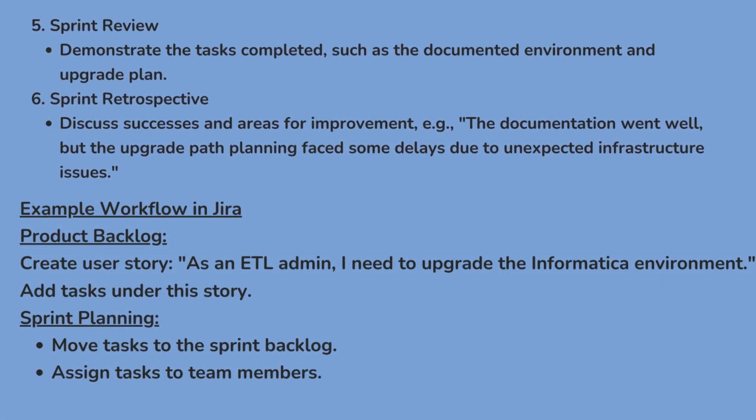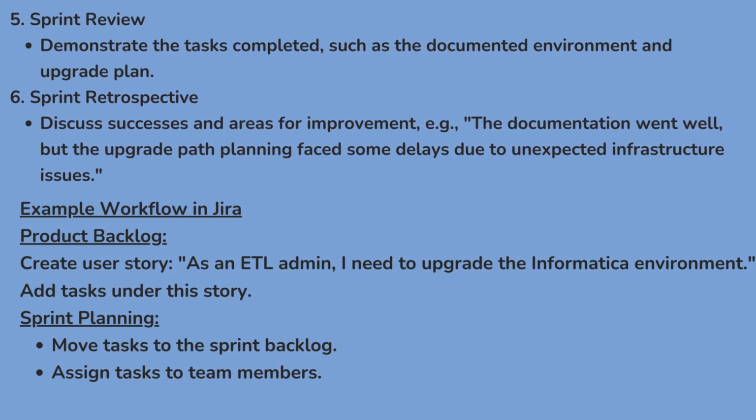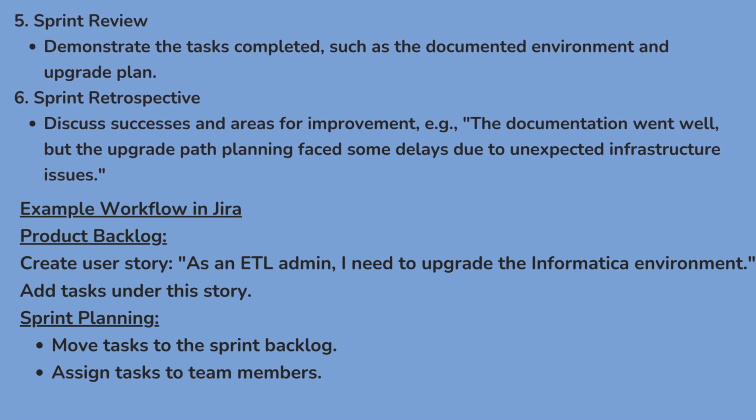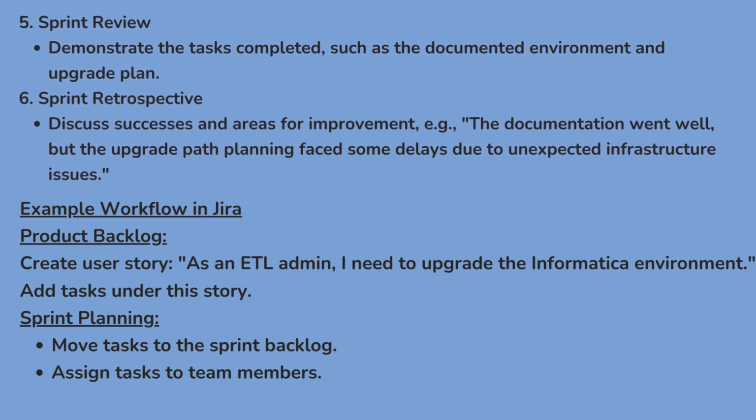Sprint review. This demonstrates the tasks completed, such as the documented environment and upgrade plan. Retrospective discusses the successes and areas for improvement. Example, the documentation went well, but the upgrade path planning faced some delays due to unexpected infrastructure issues, and so forth.